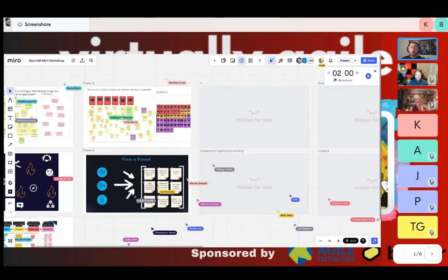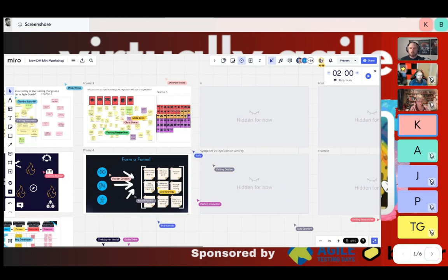I would be treating it as essentially an ongoing process that I would augment with specific workshops. So for example, you can take some of those cards and literally play a game with your team where we draw cards and then have a conversation and write stuff down together. Entirely up to you, right? This is a very broad area, but what I do often recommend is allowing as much as 2 weeks just for this period of gathering information. Now, obviously you do want to use your judgment on that, because sometimes you don't want to wait too long if you can see a problem worth solving, but you also don't want to jump too soon to problem solving before you've really understood the system you're in. So just trying to find that balance is going to be important. Okay, thank you. Cool. Did I see another question there as well?